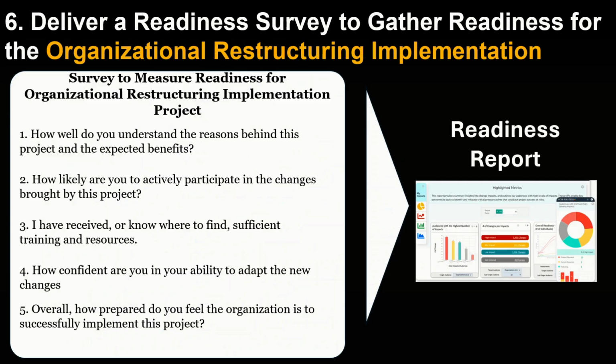And then you also want to send out a readiness survey to gather awareness, receptiveness, knowledge of the company restructuring, and other information. This allows you to define the baseline. So if in the beginning you identify that there is a lack of awareness, there is a lack of receptiveness, there is a lack of knowledge, then your change management efforts should be focused on increasing knowledge, increasing awareness, and reducing the gaps.